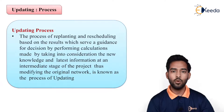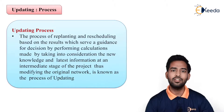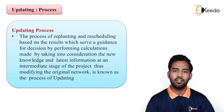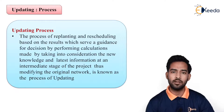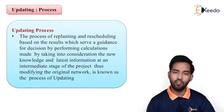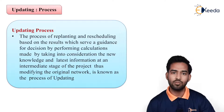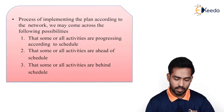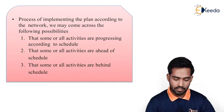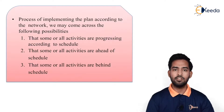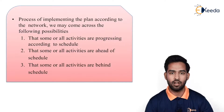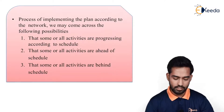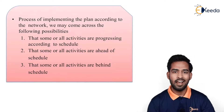For example, if a project is going on and a new technique is introduced, we have to incorporate it into the project so that delays are reduced or the speed of work gets motivated. Similarly, if some new equipment comes to market, we can use that equipment. The process of changing the original network and reconstructing is known as the process of updating. When implementing the plan according to the network, we may come across the following possibilities: some or all activities are progressing according to schedule; some or all activities are ahead of schedule; and some or all activities are behind the schedule. These are the three possibilities which may happen in any construction project.